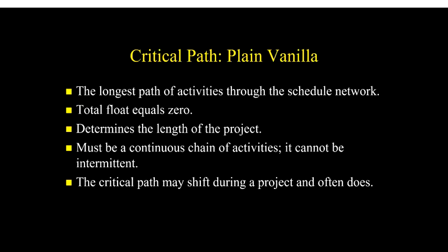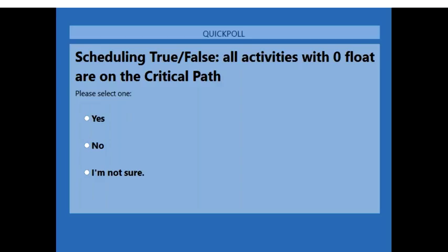And that means that there could be other delays that land on non-critical paths, which means that the impact of the delay is going to be absorbed by the float within that path. So 95% of those here are correct, and I'm so glad to hear that, because you're absolutely right. Just because we have a delay doesn't mean we're going to have an impact on the project completion time.